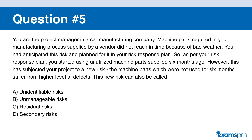Question number five. You are the project manager in a car manufacturing company. Machine parts required in your manufacturing process from a vendor did not arrive in time because of bad weather. You had anticipated this risk and, per your risk response plan, you start using unutilized machine parts supplied six months ago. However, this subjects your project to a new risk because those parts suffer a higher level of defects. The new risk can also be called: A: unidentifiable risk. B: unmanageable risk. C: residual risk. D: secondary risk.